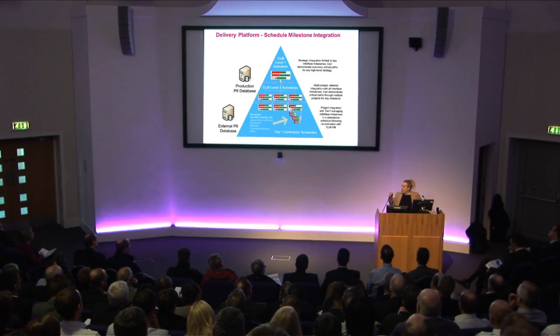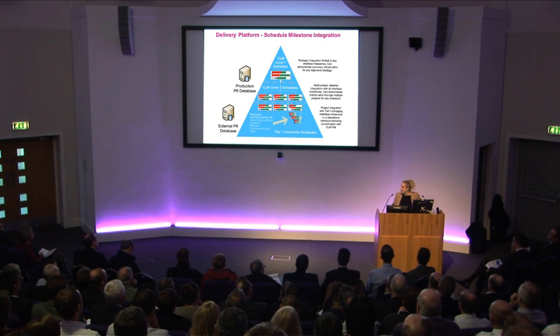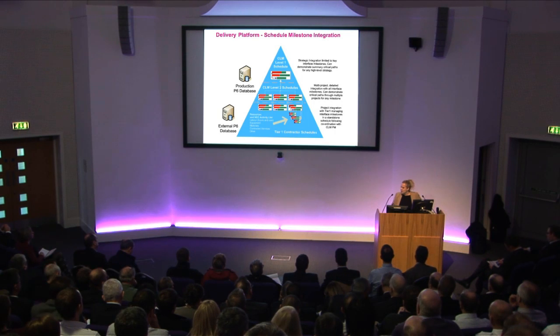So I think what we ended up doing, which was actually what made it successful, is that the planning managers spent a lot of time down with the Tier 1 contractors. We were embedded in their teams. We spent a lot of time in their offices, guiding them and teaching them and making sure that they were doing it correctly. I probably spent the most amount of time on site with my Tier 1 contractors.